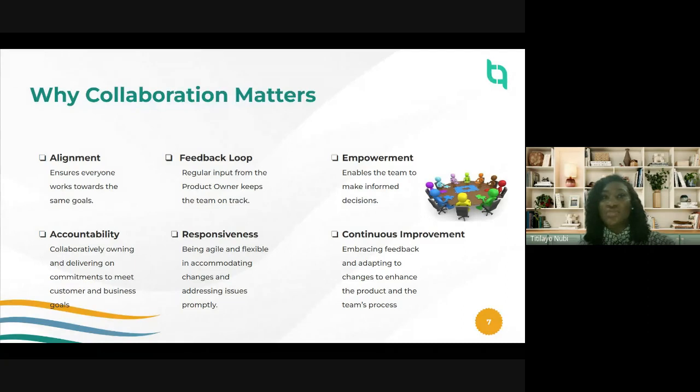Basically, this is my sprint goal. I have the capacity to deliver, for example, a registration page. But I'm not committing to that. Then the next thing, you go and commit to adding registration, sign registration, pay bills, perhaps payroll and all that. I mean, something that you cannot commit to based on your capacity, you shouldn't commit to it. If you don't have the capacity within the team to actually deliver something, it's not something to say, this is my sprint goal. The team is set out to fail if that is not happening.